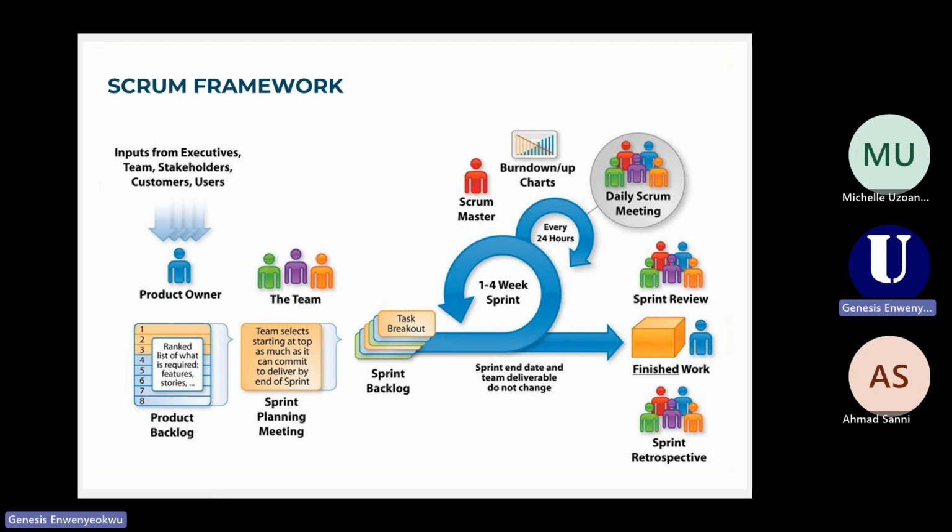And as the sprint starts, the Scrum Master is the one that manages the sprints. He or she is like the project manager for that sprint. So he or she is the one that will conduct the daily Scrum, facilitate the daily Scrum, where every team member would provide updates on their work on a daily basis for 15 minutes. The Scrum Master will also develop charts like burndown charts and all of the rest. Scrum Master will also help in removing roadblocks or hindrances along the way of the team members.